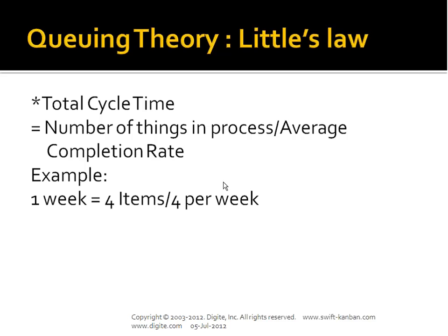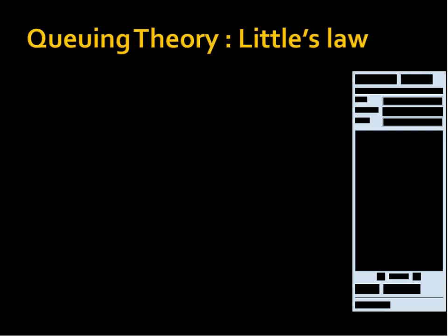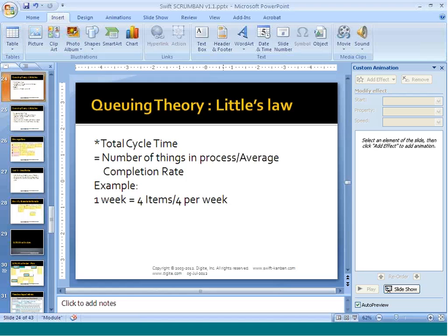So basically, in this equation itself, it's a very simple thing. Ultimately, if you compare it with a feature, so for example, if you're working on 4 features, and if you are able to deliver each feature independent of the whole batch size, your overall cycle time is much smaller, right? Because you took one thing at a time, and delivered it. Whereas if you work on 3 features, you will keep switching between the 3 features and multitask your way, and therefore you'll get much higher cycle time. So it's as simple as that.